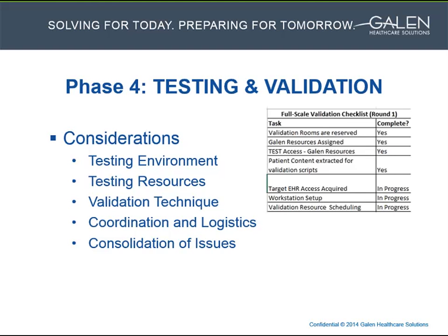So after testing is complete, the issues will need to be consolidated and reviewed. Prior to testing, it should be decided how the testers will record issues during validation. We often provide clients with paper test scripts, which we then consolidate into an electronic document when testing is complete.